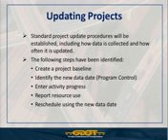A new piece of this now with the introduction of resource management is also updating the individual resource assignments as well, and then rescheduling the project using that new data date, right? So you have the old data date, where the last time the project was updated to, you identify a new data date, you update all of the activities occurring within that time period, and then reschedule all of the remaining work using the new data date.